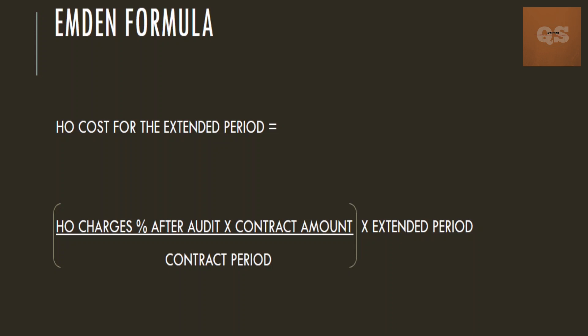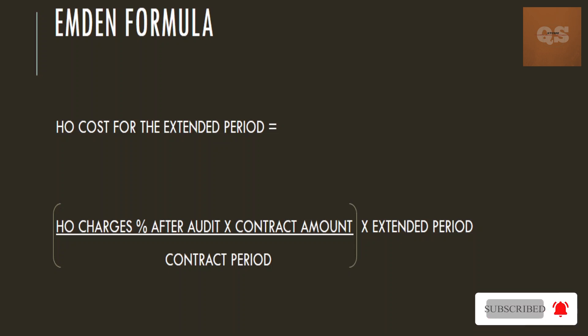The Emden formula is: head office charges percentage (after audit) multiplied by contract amount, divided by the contract period, multiplied by the extended period. Once you find out the total expenses after audit, that amount divided by your total contract amount gives your head office charges percentage after audit. So if X is your total amount spent in the head office and Y is your contract amount, then (X divided by Y) multiplied by 100 gives your head office percentage after audit, which is then used in the Emden formula.